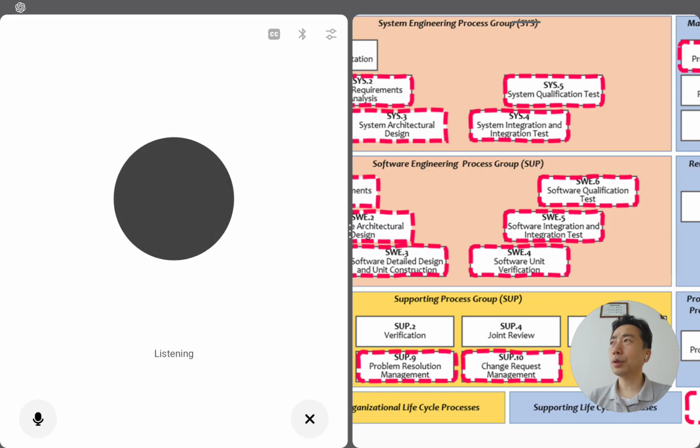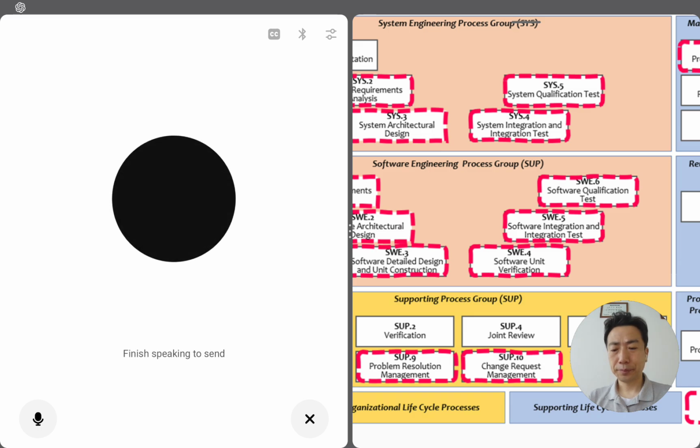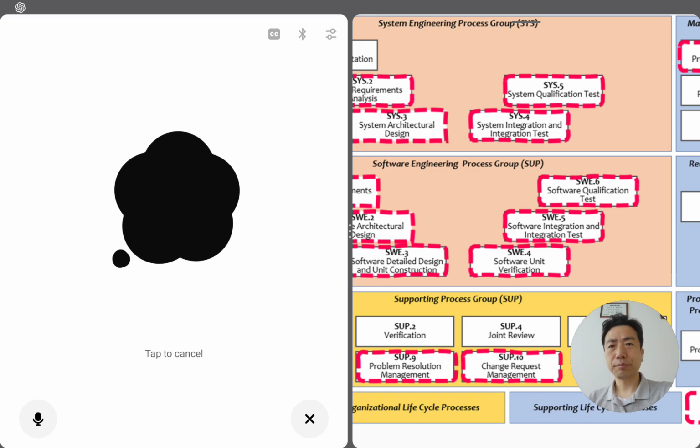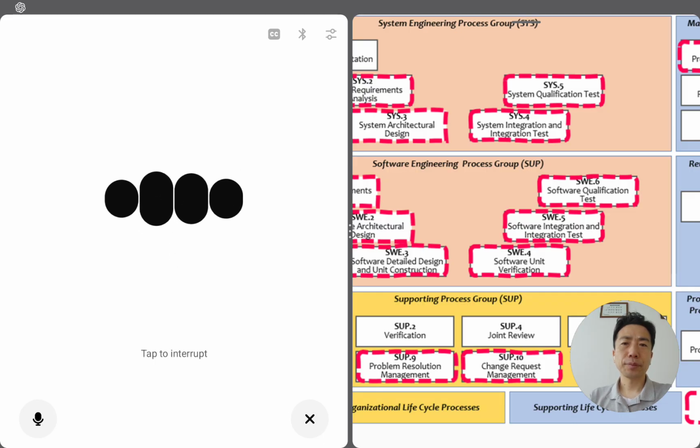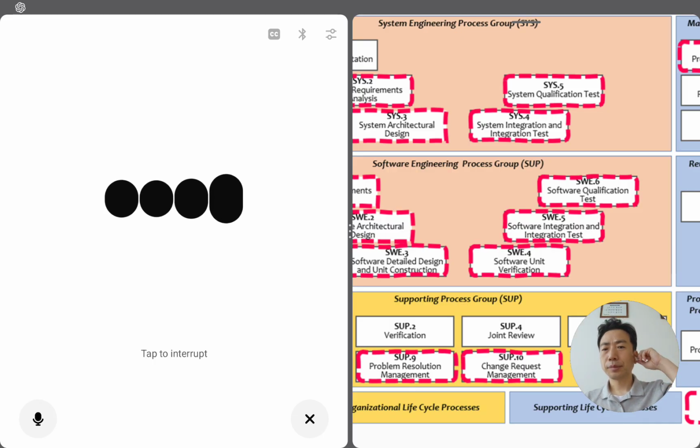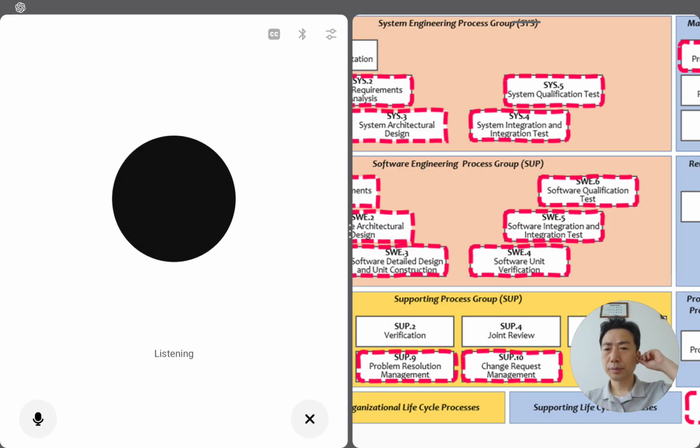I'm sorry, one more time, please. Of course, resolved means fixed. Closed means finished. Resolved only means the problem itself was fixed and verified. Closed means everything around it. Documents, lessons learned, and follow-up actions are also completed.